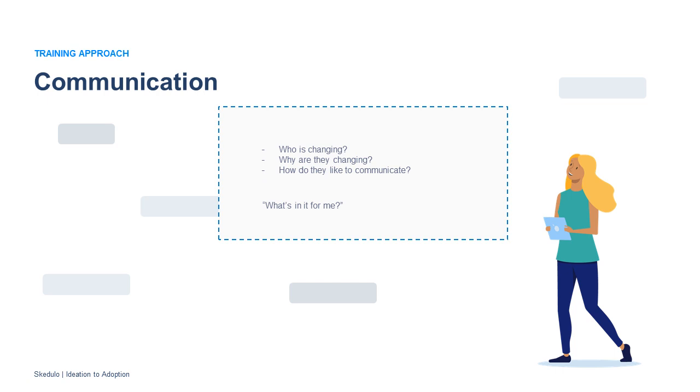Next, go a level deeper and identify those who will be impacted the most versus the least, so that you can prioritize your communication accordingly. A 3-tiered system as simple as high, medium, and low can help you stay organized and targeted in your communication.